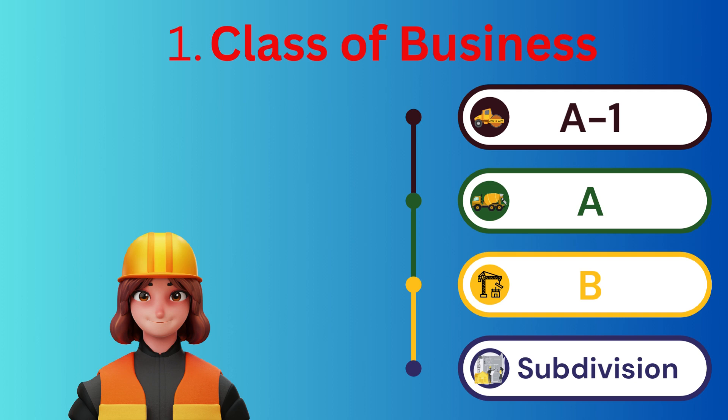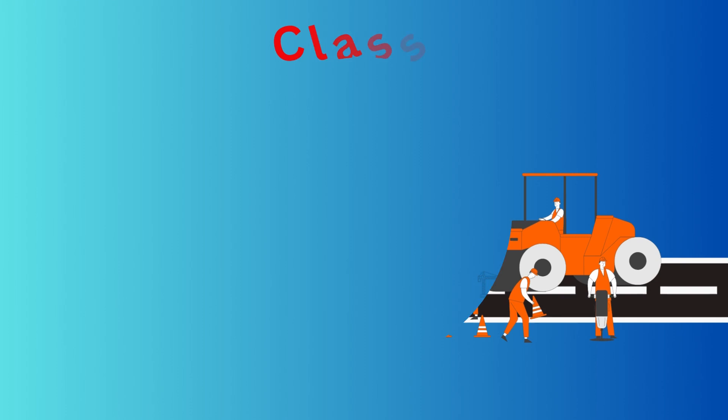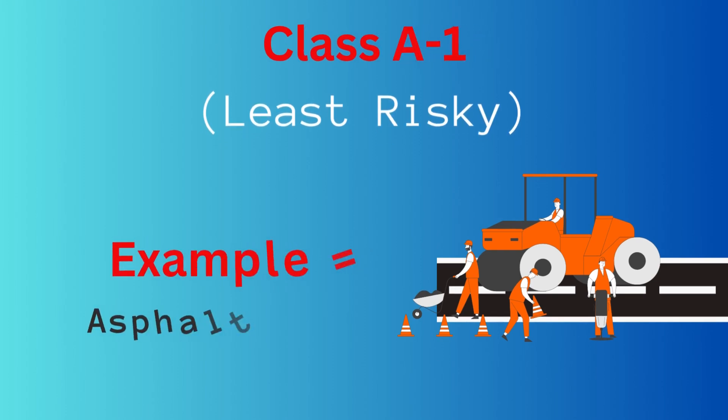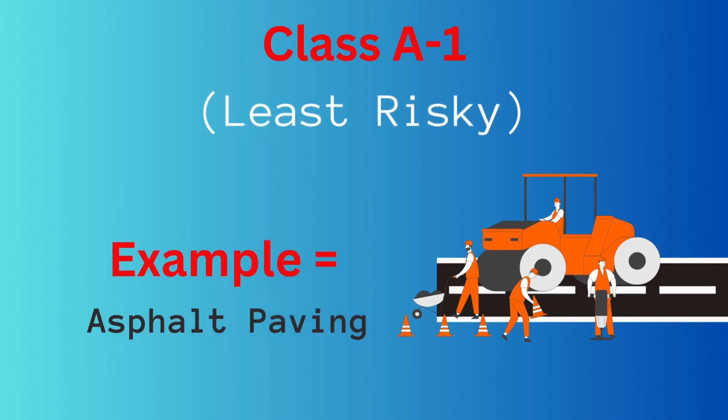Most construction work falls into one of four categories: class B, class A, class A1, and subdivision bonds. Class A1 is considered the least risky from a surety bond perspective. Asphalt paving falls into class A1.